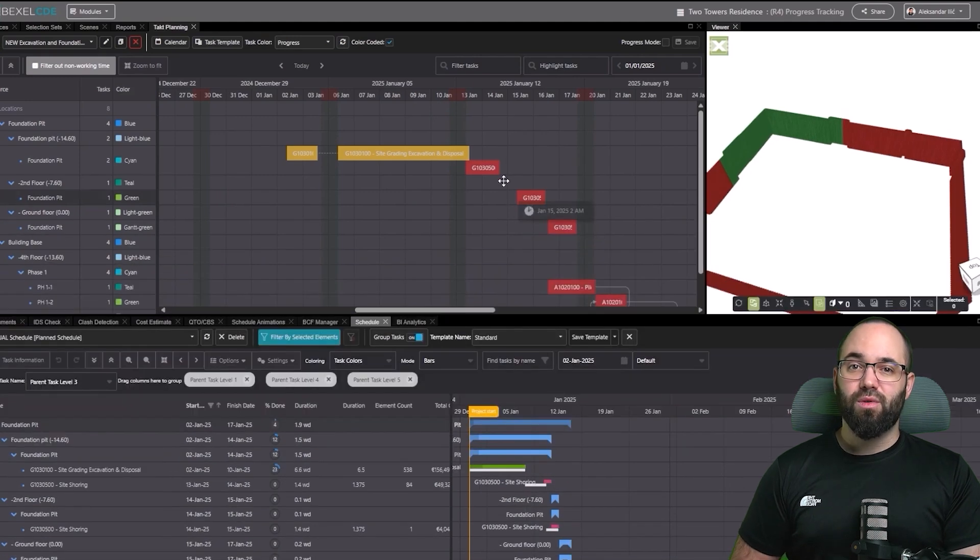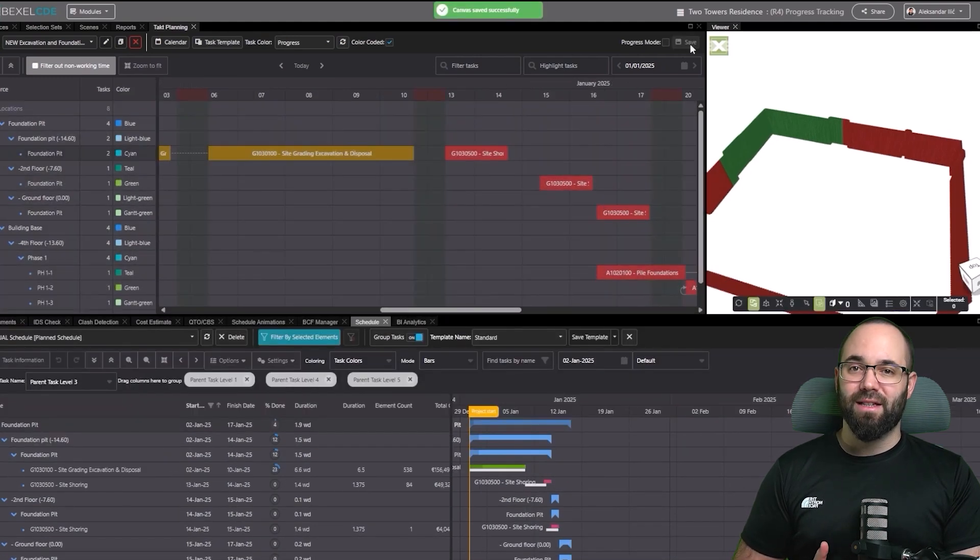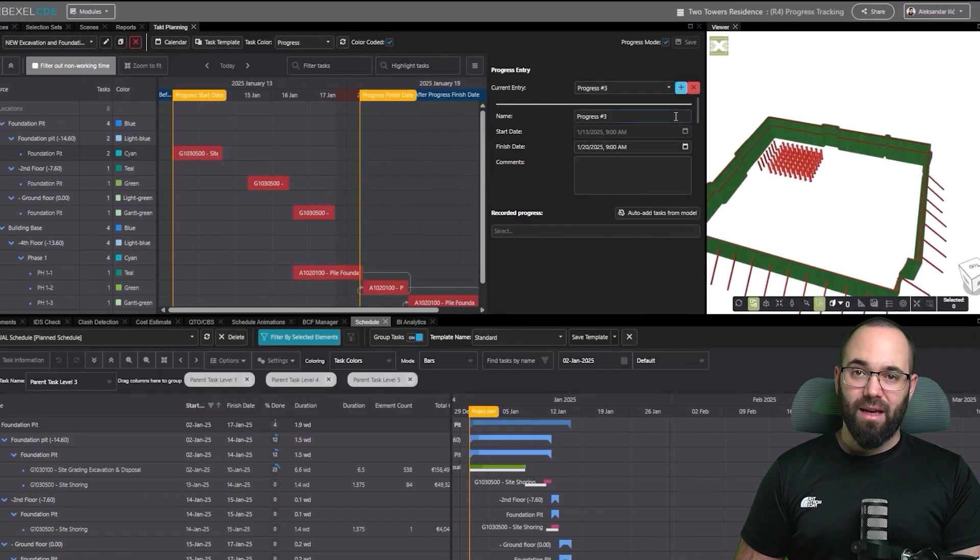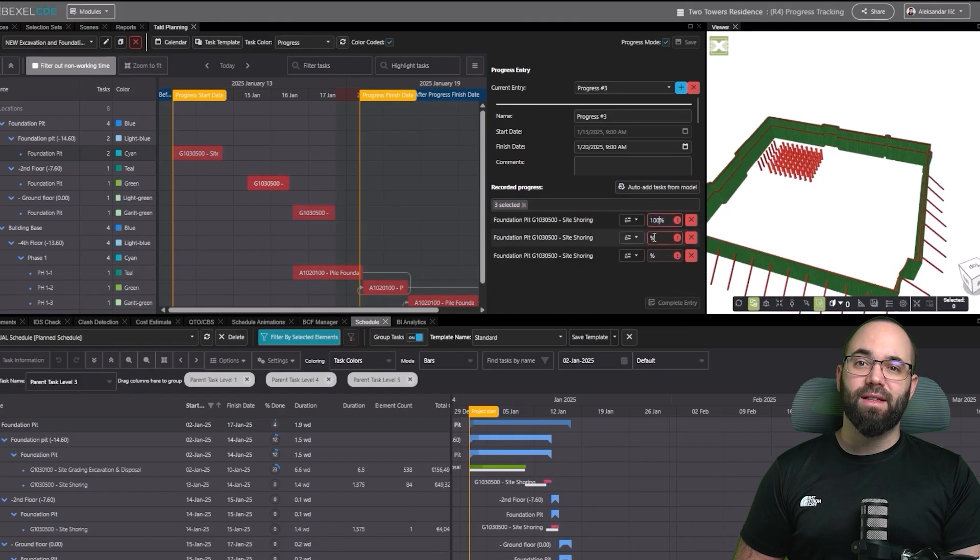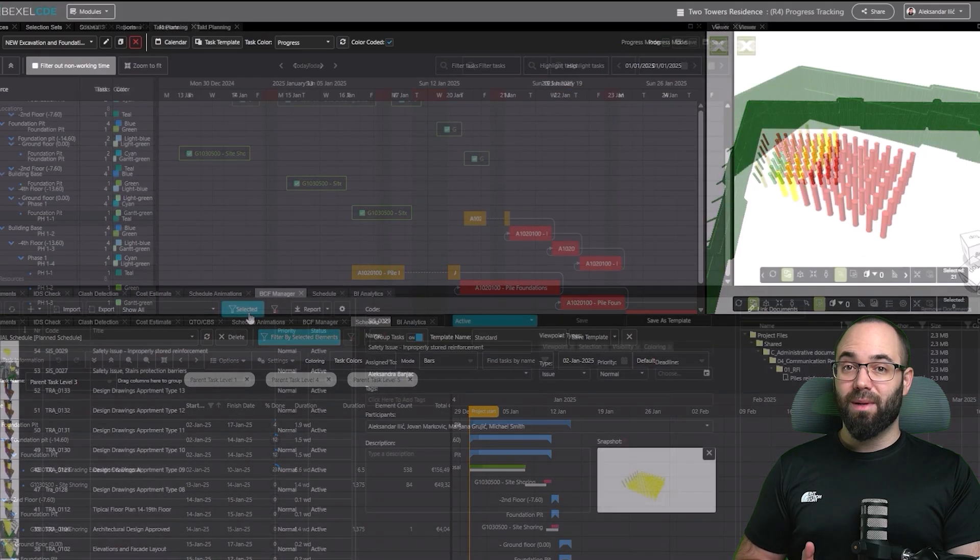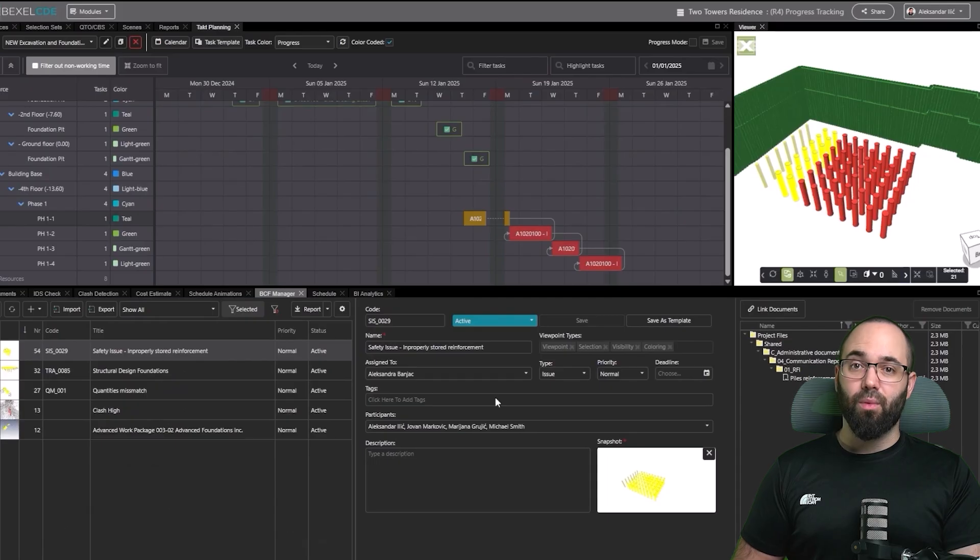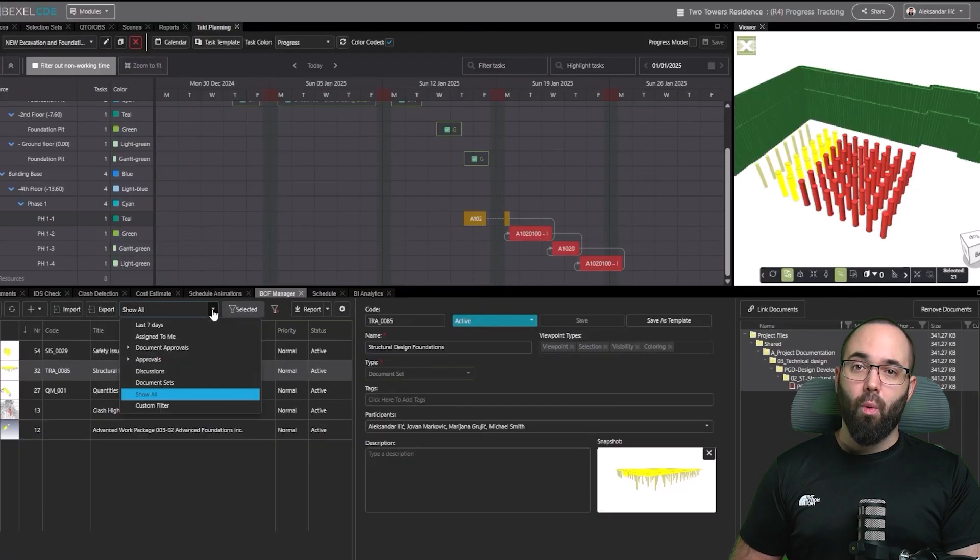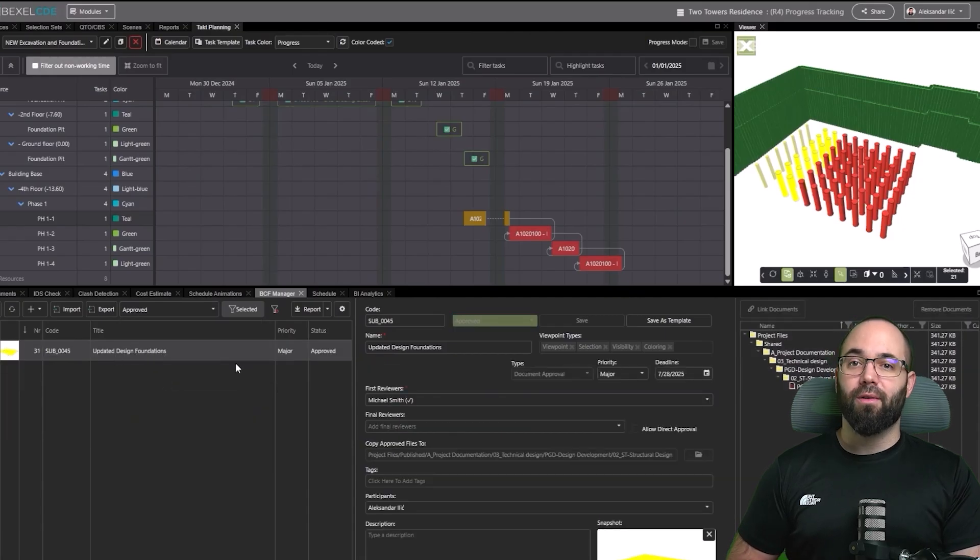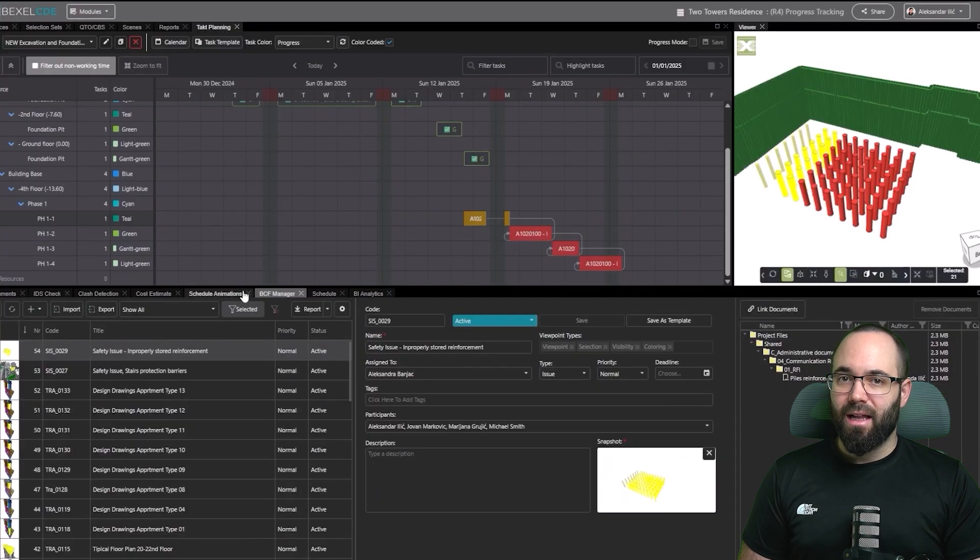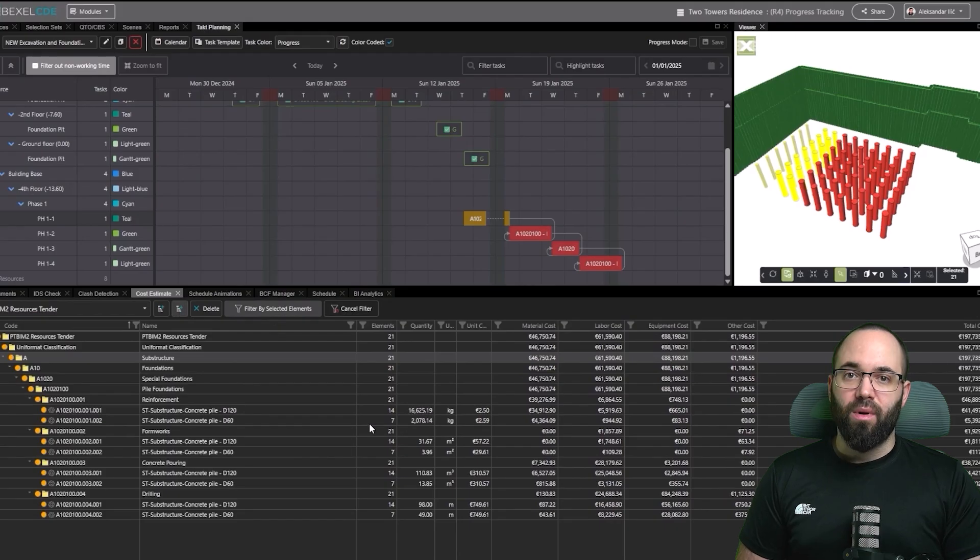We continue with additional updates. For the next week, progress is entered by percentage for an entire task. In the following week, three tasks are updated the same way, while the fourth once again uses the element-based progress input for precision. Tact planning also integrates seamlessly with other workflows. You can select any element from the plan to create issues or approvals in the BCF manager and attach documents for clear communication. In the cost editor, you can filter by selected elements to instantly display cost information only for the items you're tracking.